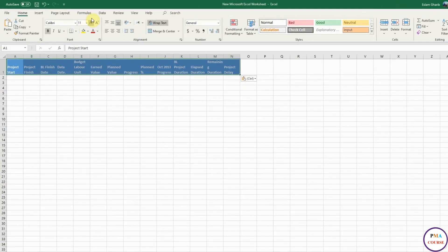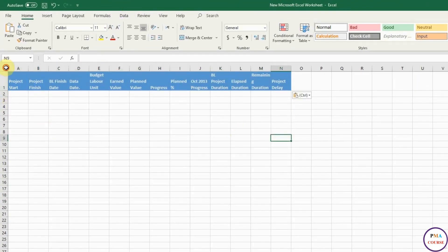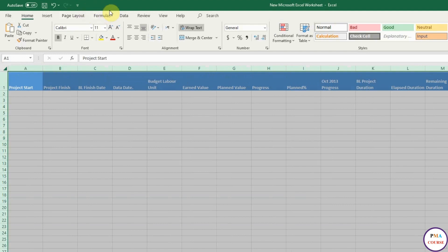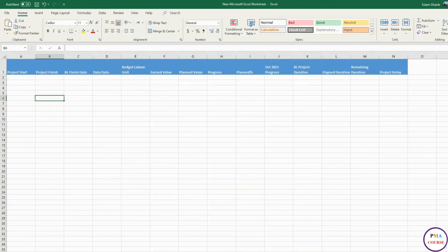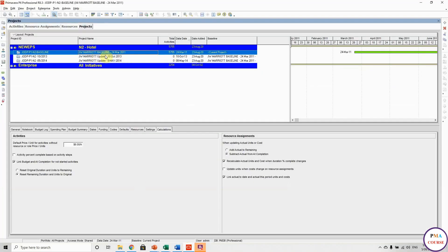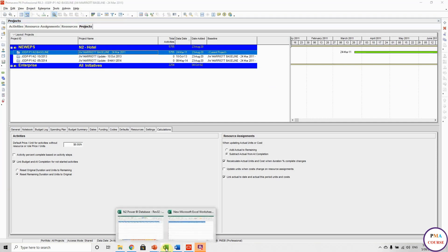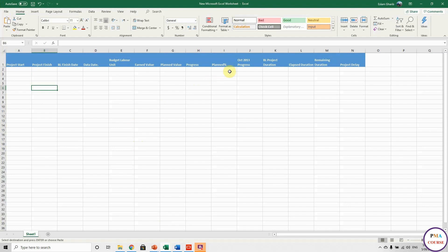I prepared the list. So it is: project start, project finish, baseline finish date, data date, budget at completion units, earned value, planned value, progress percentage, planned percentage, and October 13. Remember when I told you we are going to work on three programs: baseline, October 13 dates, and May 14 dates. May 14 is the last update and we are going to compare between May 14 and October 13. So here we are going to put October 13 progress, baseline project duration, elapsed duration, remaining duration, and project delay.